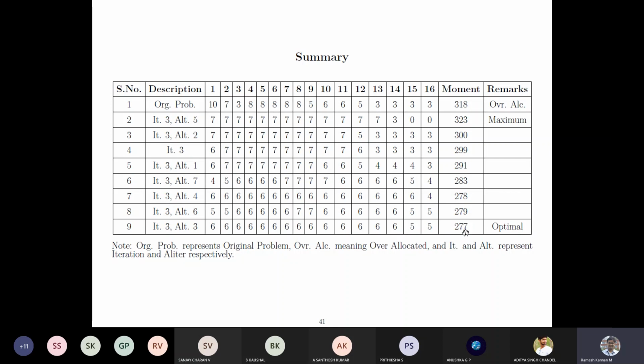So this is typically the minimum moment method. When the moment is minimum, it's almost balanced smoothly, so the leveling is pretty smooth, which means the correlation to the minimum moment is that the level profile is pretty smooth. So that's what it basically means. And you can even try different simulations, different things. You can note down that this talks about the overall moment, right?